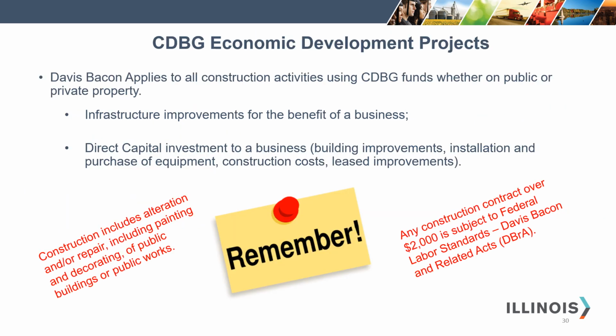Just a quick note about CDBG economic development projects. Davis-Bacon does apply. Davis-Bacon applies to all construction activities using CDBG funds, whether on public or private property. If the CDBG economic development grant is for a construction project, Davis-Bacon applies.